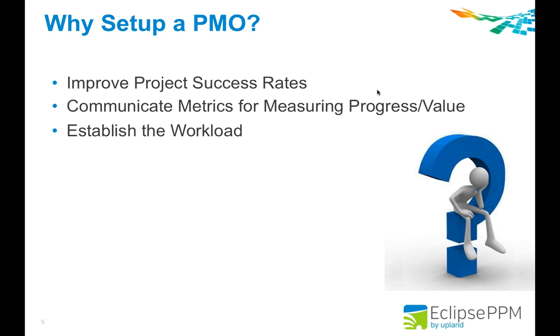Resource management and the data required to support it may also be a driver for your organizations. We must be able to forecast resource demand for new projects, but new projects are not really the primary source of labor spending in today's world, believe it or not. So it's very important that we're able to analyze not only new project demand, but other operational work such as service requests, IT requests, and non-project work. So resource management is definitely a key focus for many PMOs.